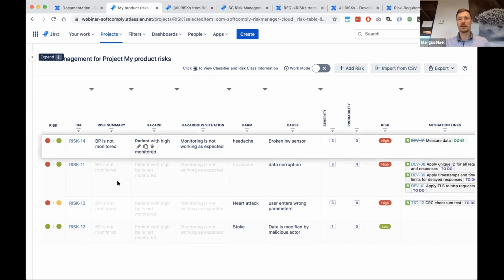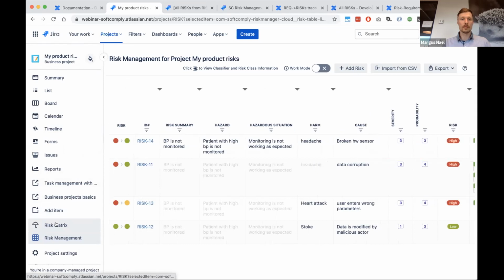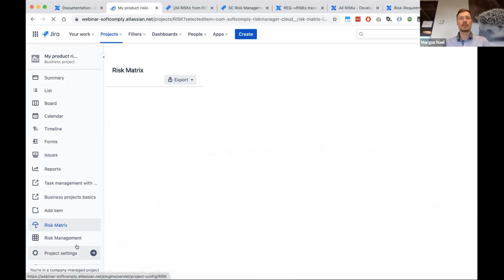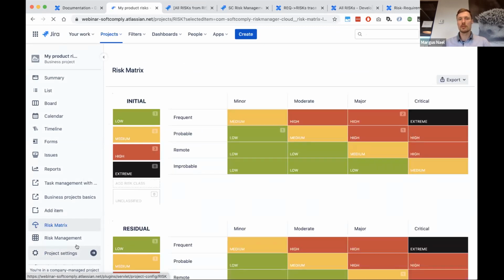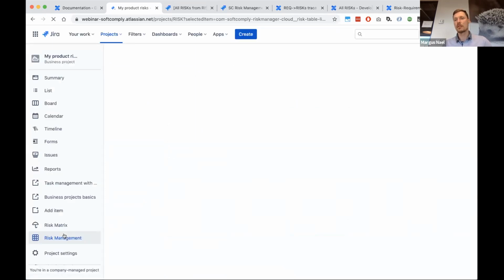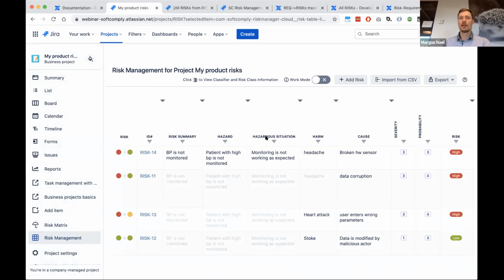This project has risk model established by defining the risk matrix. We have severity and probability values, and then actually under the spreadsheet view that you just a moment ago saw, you can start entering risk and then creating links between risks and either requirements or test cases.